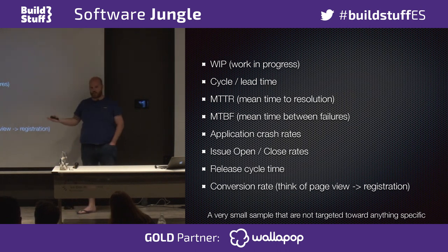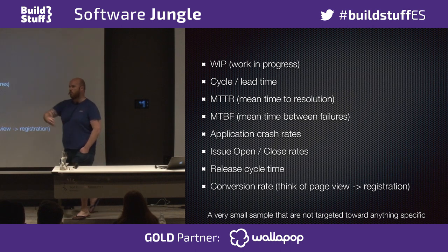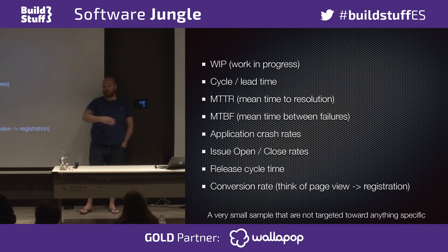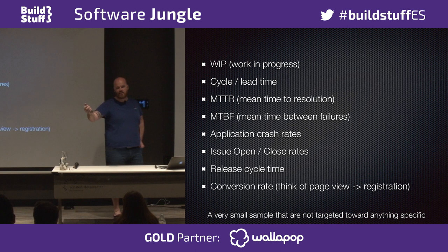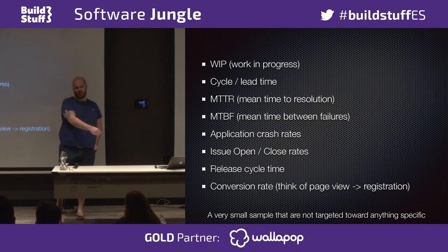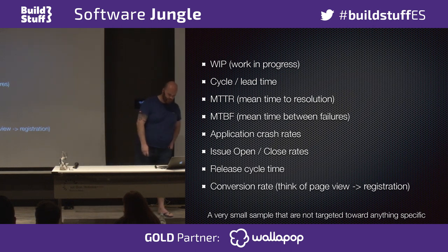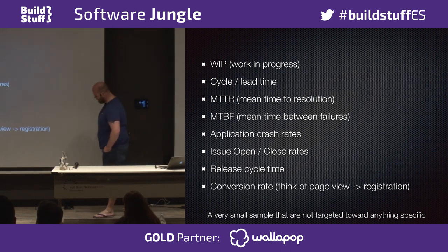Now, we can have measurements based on that because the developers I worked with were very useful in creating work-in-progress pull requests so that people could track what was going on and see what changes were happening. So work in progress was very important for me and my team because I wanted people to finish what they were doing, because context switching is a killer. It's an absolute killer. So finish what you're doing and then start the next one. Okay? Cycle time and lead time.